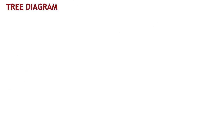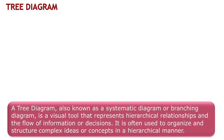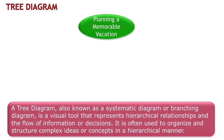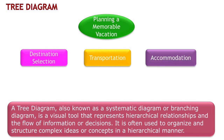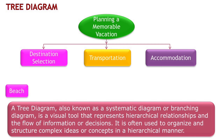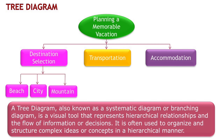A Tree Diagram is a visual tool that arranges ideas or concepts in a structured manner. It helps us understand relationships and the flow of information or decisions, and simplifies complex information. For example, if we are planning a memorable vacation, we start with the main categories: destination selection, transportation, and accommodation — these act as the main branches of our diagram. Under destination selection, we can further break down options like beach, city, and mountain. Under transportation, we can have branches for flight, train, and road, indicating different modes of transportation available.